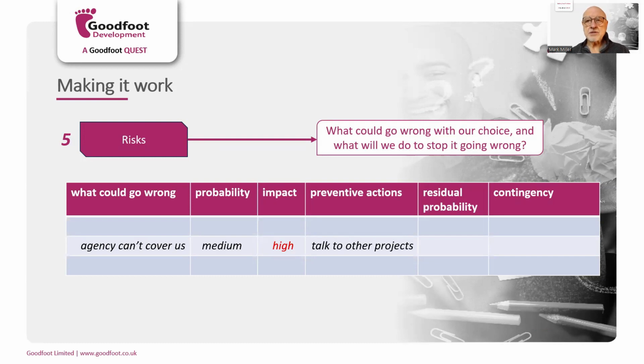The key element to maintain the decision and make sure it works is this. The preventative action that we agree to stop the future problem happening, to limit the risk, must go in the plan as an action for somebody or several people to carry out. What is really, really sad is creating these preventative actions and then filing them away. They go into the work plan, right? They go into the plan for somebody to do. Then we look at the work plan in the next review meeting. Have the preventative actions been implemented, and has the problem been averted?